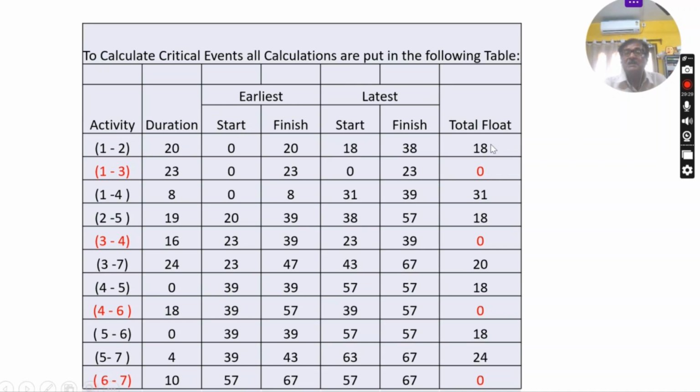Here is a slack time, you can say. You can wait on that task, and use the resources for that period for any other activity. That is the advantage of critical path analysis or network analysis.